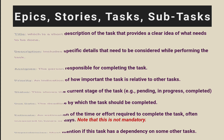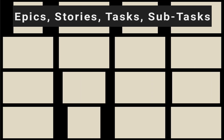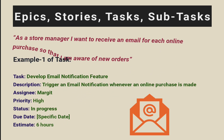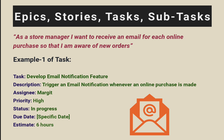Let's look into examples for the user story we discussed earlier — as a store manager, I want to receive an email for each online purchase so that I am aware of the new orders. The first example task is: develop email notification feature. Description: implement the backend functionality to trigger an email notification whenever an online purchase is made. Assignee: Mark. Priority: high. Status: in progress. Due date: a specific date. Estimate: 6 hours.